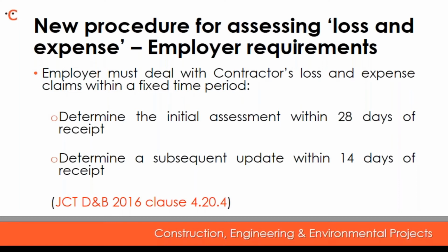The 2016 edition does not make provision for the employer to be able to defer the determination of the loss and expense claim until the actual loss suffered by the contractor is clearer, and it is not clear whether the employer could later challenge the amount awarded.